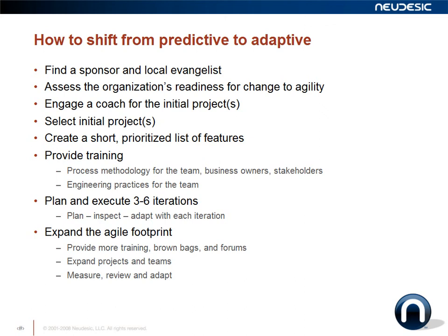With every iteration, you will plan, and at the end of the iteration you'll inspect — including feedback in a demonstration to your customer or product owner — then adapt and move on to the next iteration. You're constantly learning and taking action on your learnings with every single iteration. It's not a situation where at the end of the project your final action is a lessons-learned or post-mortem that becomes a piece of shelfware. In agile teams, you take action on those lessons every single iteration.